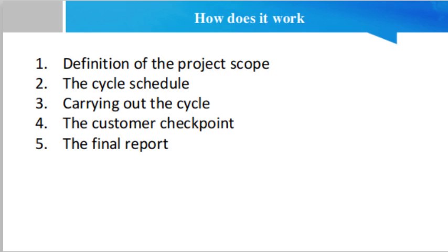The next one is the cycle schedule. The project is divided into many projects or cycles, also called iterations, and each cycle must provide one or more deliverables. This second step involves the planning of each project cycle. The objective is to define and plan the tasks to be accomplished. You list the individual tasks according to the WBS, establish the order in which they are to be carried out, identify their interdependencies, assign them to your employees, and define their deadlines.